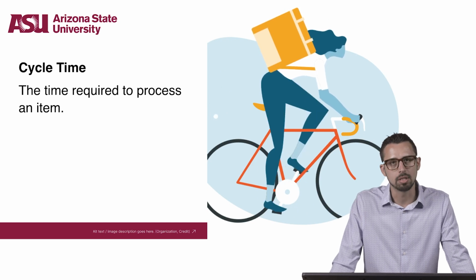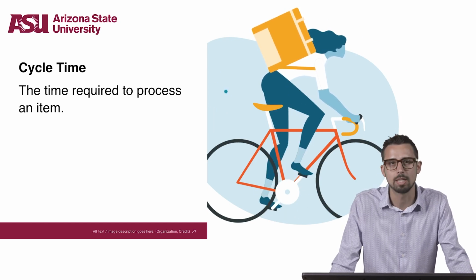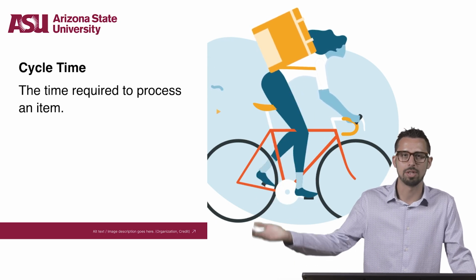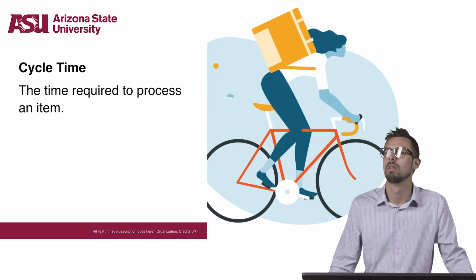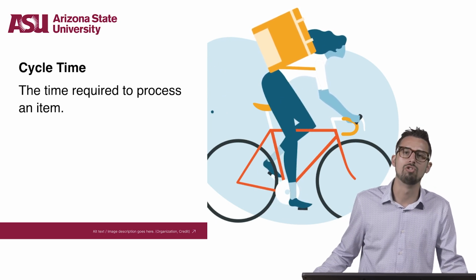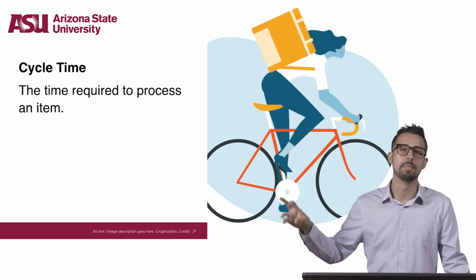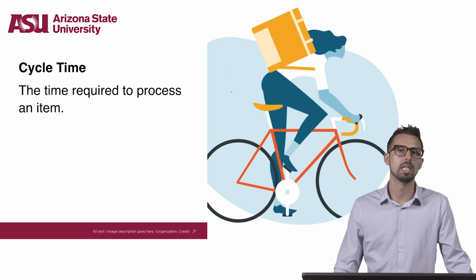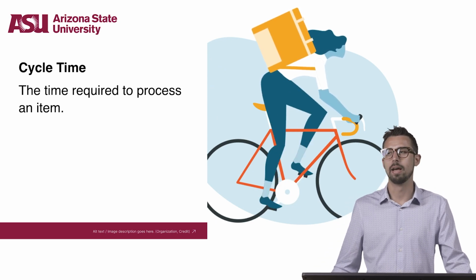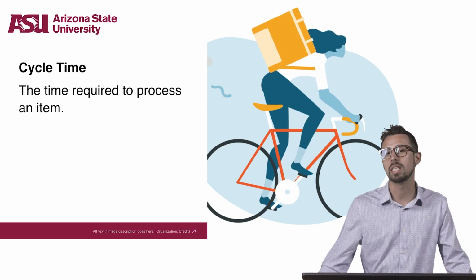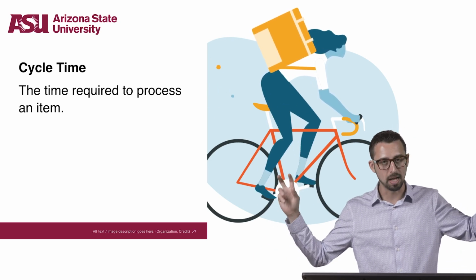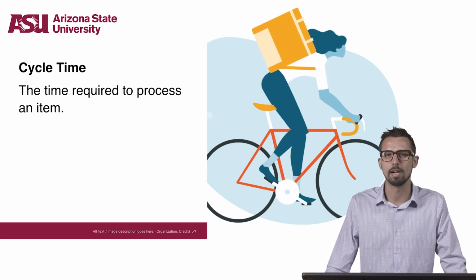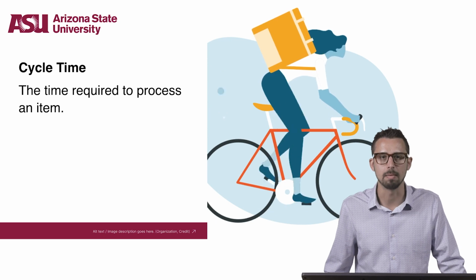Taking a look at cycle time, let's say a stakeholder walks by your desk and says, hey, I need you to design me this brochure. Here's all the copy. Let me know what else you need. Cycle time is the amount of genuine working time that it takes to complete that task. Oftentimes we'll express completion in number of months or days. Cycle time aims to pinpoint down the exact number of people hours or man hours applied to that task, and would therefore require much more rigorous timekeeping.